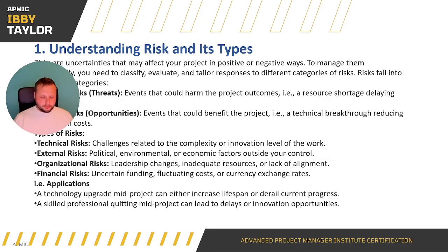Organisational risk. That could be changes to the organisation, both internally in your own organisation and also the customer's, because that can have a big knock-on impact on smooth project delivery. If you've got a single point of contact with the customer and they then leave, if it's a very tough project to understand, the next person being onboarded might take a long time to understand, might not be able to grasp it. That's going to come with its own challenges and complexities. So organisational risks.